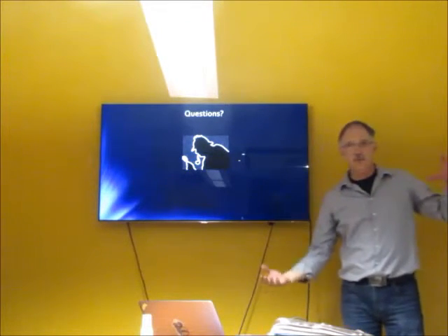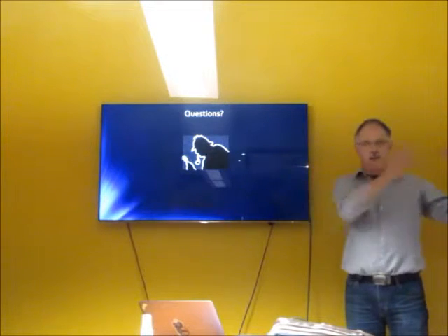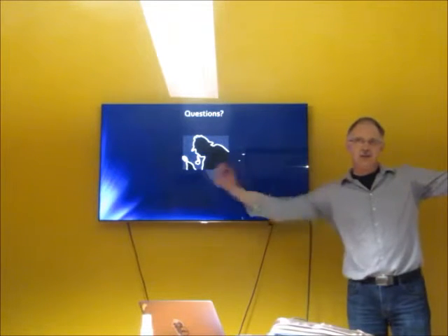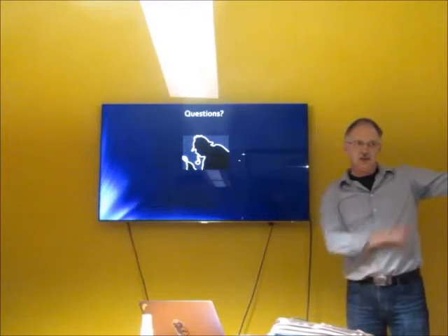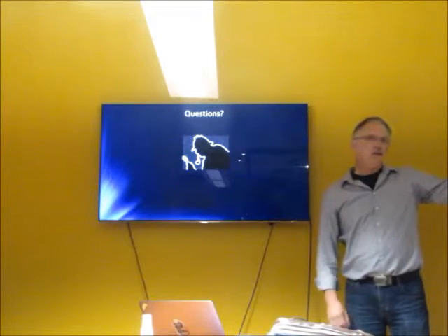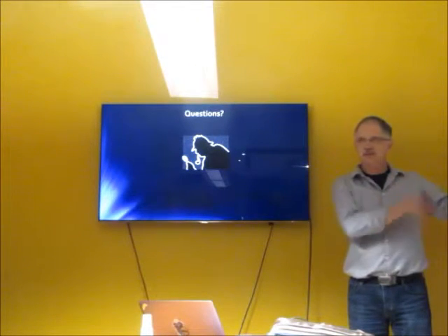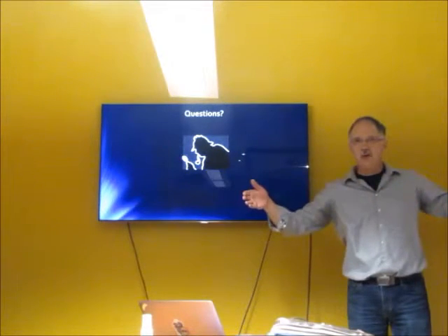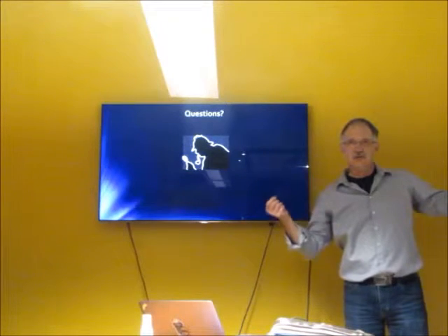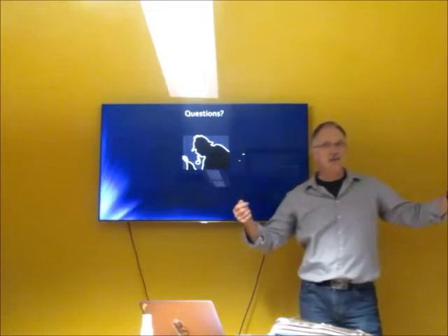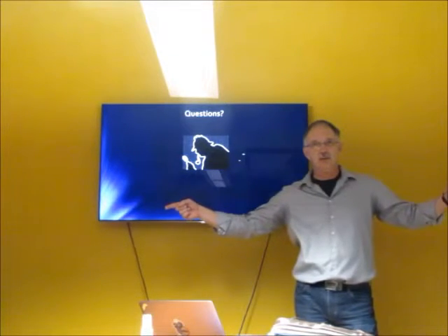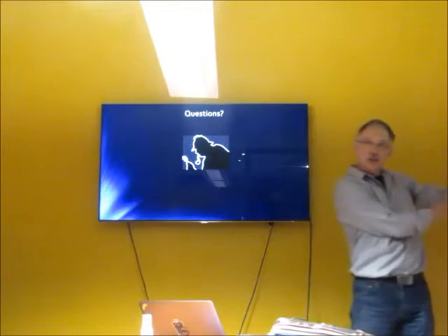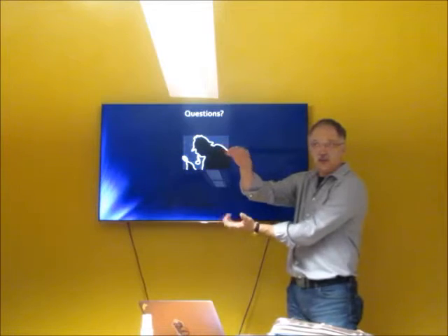And then as you go through, it's kind of like if you're running agile sprints to get something done. You have a target of, I need my user experience to be less than 1 second. Sprint 1, this is prototyping, I'm going to put something together, 5 seconds is fine, I don't care. But by sprint 3 or sprint 4, you're going to be tightening up the performance and saying, no, I need you to get below 2 seconds here, because we need to hit 1 second at the end of the time period. So performance, as I said, is iterative. It goes throughout the whole life cycle. It's not something that's done once here, and it's definitely not something that's done once at the end of a project.